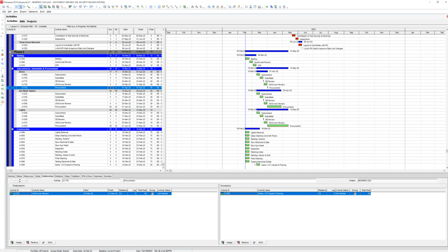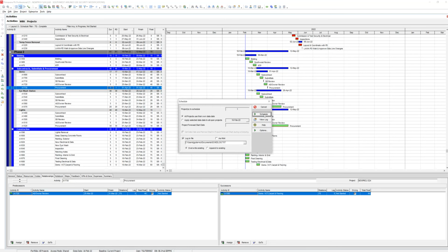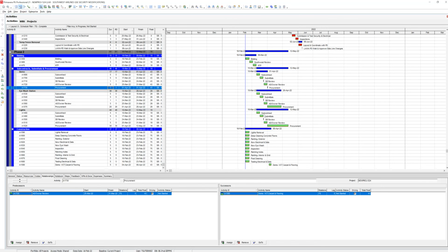So a lot of the times we get in trouble because we don't add that time in our schedules. So we always promise that we're gonna start demolition a lot earlier. But in reality, it doesn't happen. There's a lot of paperwork, right? So track that paperwork. So watch this. March 9th, look at it now. Let's see how many days we're going to lose. April 4th, right?